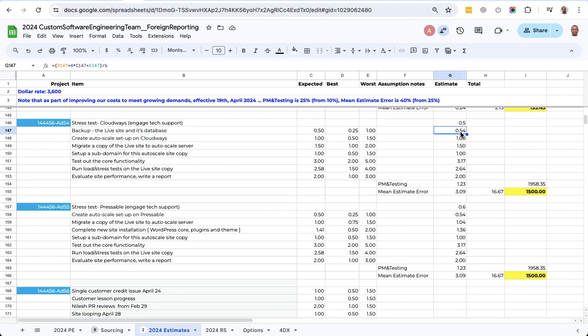Bear with me because many people come and add in estimates. Sometimes you run into estimates where this 3-point estimate, the totals were not added properly. But just as a rule of thumb, if you look up here, if I click this, the best time, we take that as is, then the expected time we multiply by 4. This is really a standard. We multiply by 4, and then we just also add the worst time, and then divide everything by 6. So everything is already in.